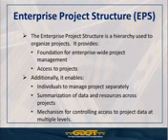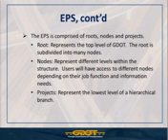It enables us to summarize data and resources across projects. And we'll take a look at what the specific EPS is that we've developed for Georgia DOT in just a minute. The structure itself is comprised of three things: routes, nodes, and projects. A route is the highest level of the hierarchy. The nodes would be any children within the hierarchy, and then the projects are these individual schedules within the EPS.